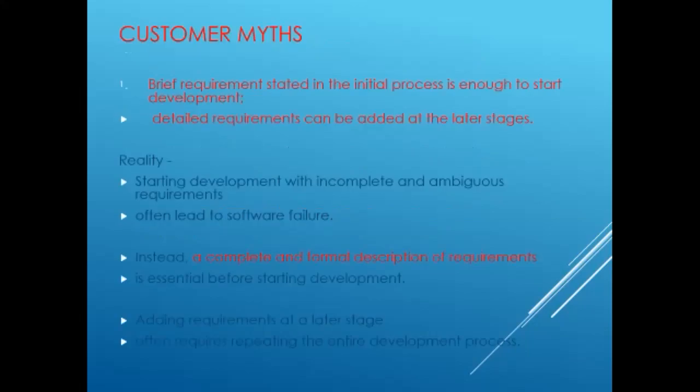Friends, here are the customer myths. Customer myth number 1: brief requirements stated in the initial process are enough to start development. The detailed requirements can be added at the later stages. But the reality is that starting development with incomplete and ambiguous requirements often leads to software failures.